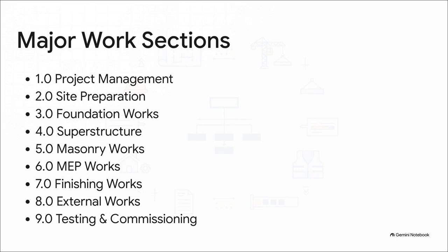And notice how it moves logically and chronologically. We go from project management and site prep, down into the dirt with foundation works, up into the sky with the superstructure and masonry, then threading the systems with MEP, dialing in the aesthetics with finishing and external works, and wrapping it all up with testing and commissioning.